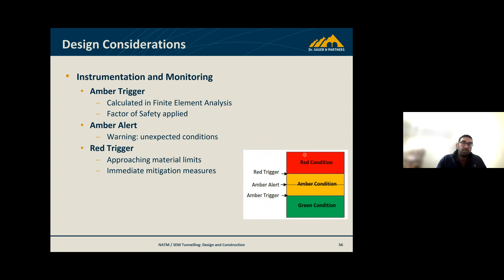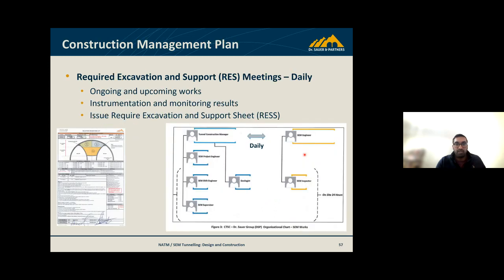Trigger alerts for your various assets need to be considered. The RES meeting daily, this is a nice little graphic of who the people are that need to weigh in on the RES meeting, and it's quite important for a RES meeting to have the right people there to give you the right information and make decisions within the meeting as you're tunneling away.